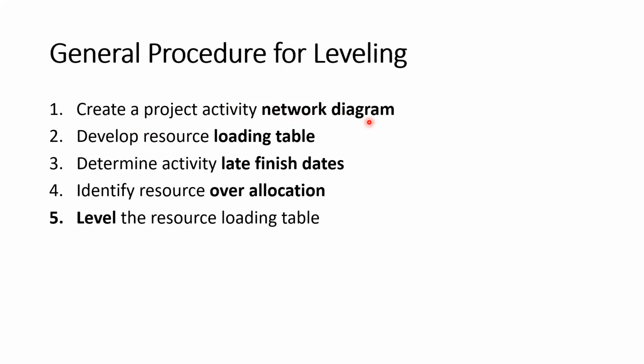And as the second step, you have to develop the resource loading table. And determine activity late finish date. After having the resource loading table, you can identify the late finish date and identify resource over allocation.